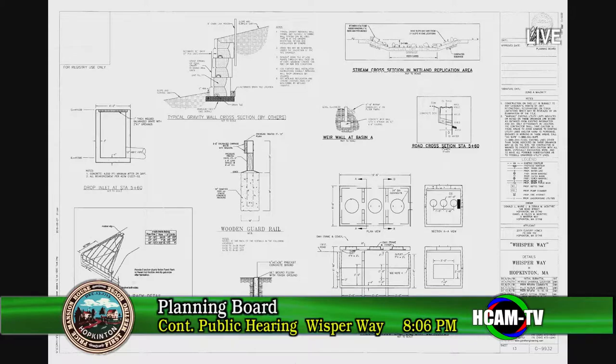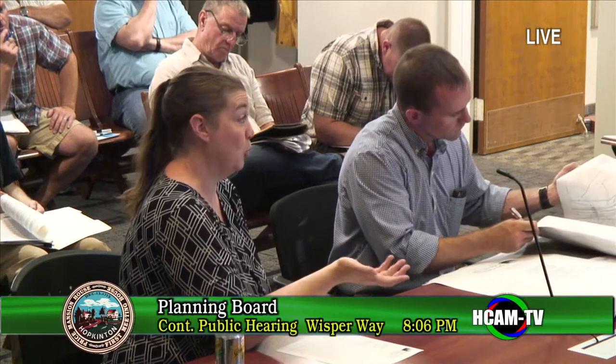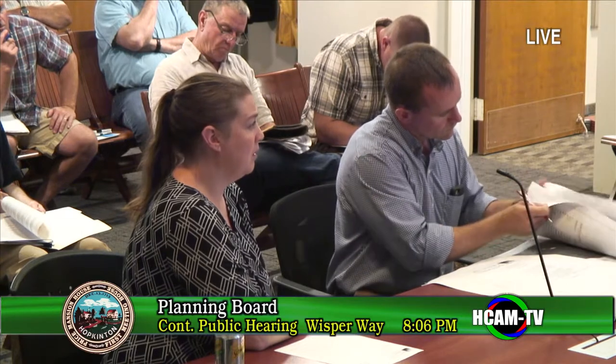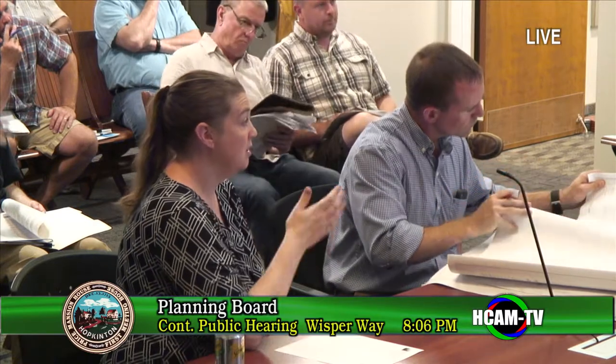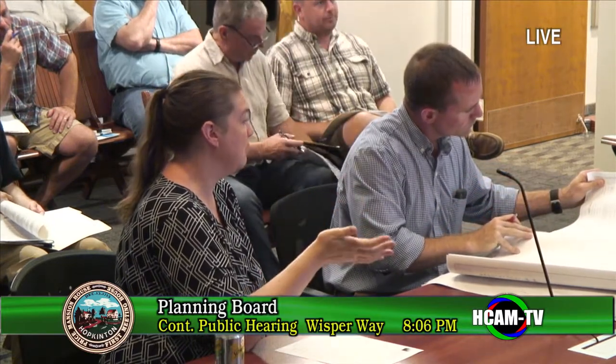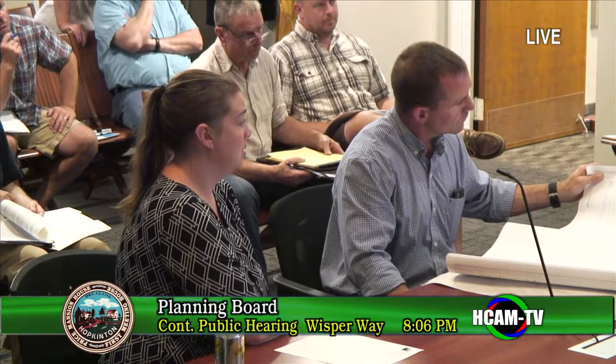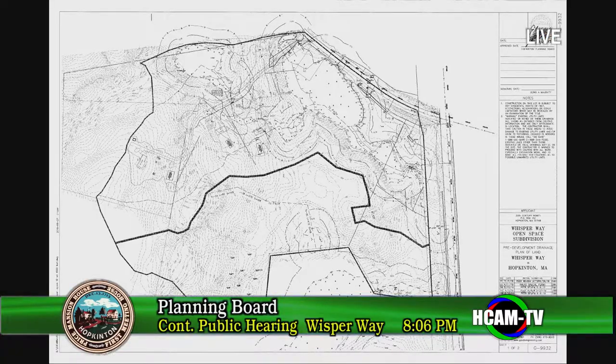Again, the Conservation Commission is reviewing this, and their only concern really is the wetland protection. And so where would the 2-to-1 slope be in reference to the wetlands? It's definitely a minimum of 50 feet outside of the wetlands, because the detention basin itself is not allowed to be within 50 feet of the wetlands. I still am waiting for a definition of where that fabric's going. It's on sheet 10, the detail of it, on the bottom left-hand corner of the earthen dike.